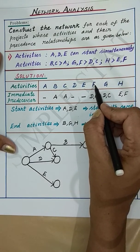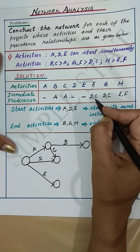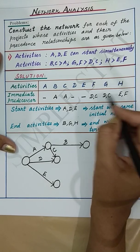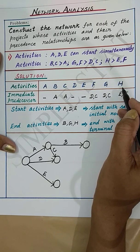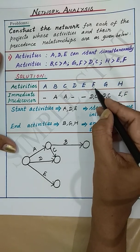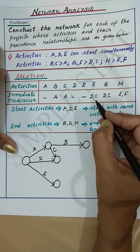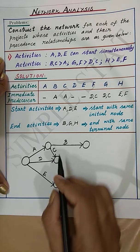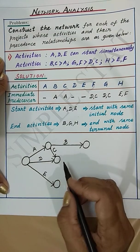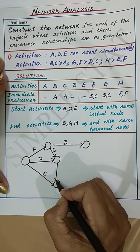Next, activity F occurs after D and C. Activity F occurs after D and C, but it also occurs along with E as the predecessor for activity H. Therefore, activity F should start after C and D and end where activity E ends. So we can draw activity F accordingly.